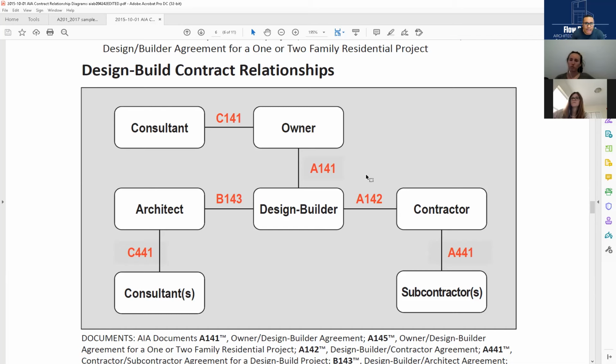Now this thing is becoming a construction change directive, because yesterday they told me the mistake and I said I want it fixed. I don't care what it takes. Fix it. And I'm not paying you for removing the flooring and for the trim. In fact, they don't think they're paying me for the actual leveling of the floor, but I'm issuing a change order, and hopefully I don't have to issue a claim. They're friends, they're good people. All my clients are great. I don't have issues. The way I have it is, if I have to absorb it, I will absorb it, but I would let them know that they were supposed to pay for the leveling of the floor anyway. And keep friends, right?